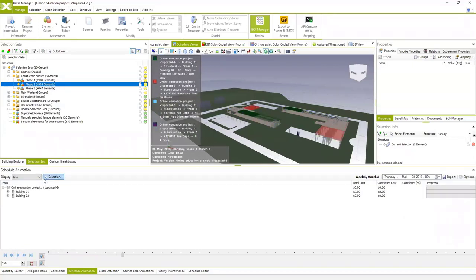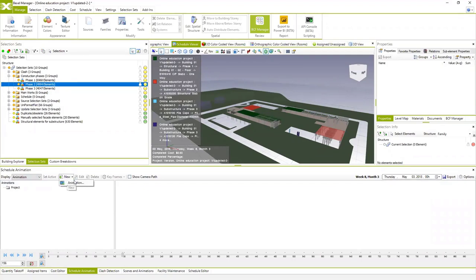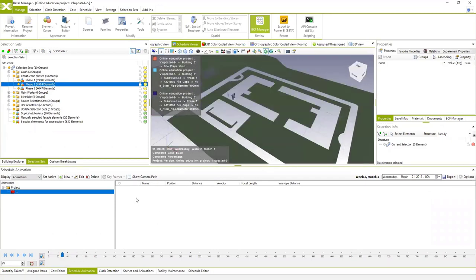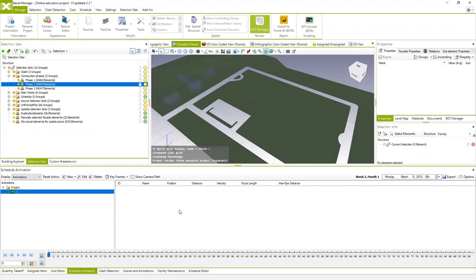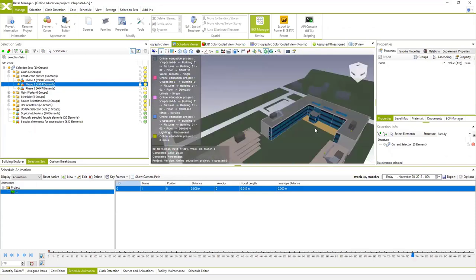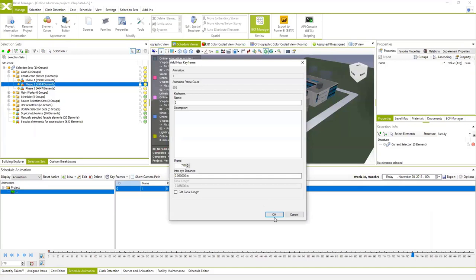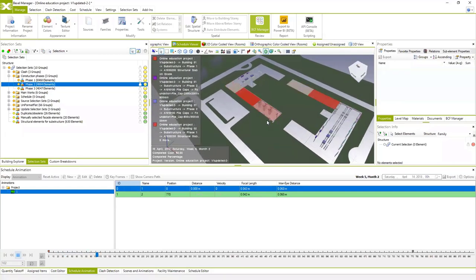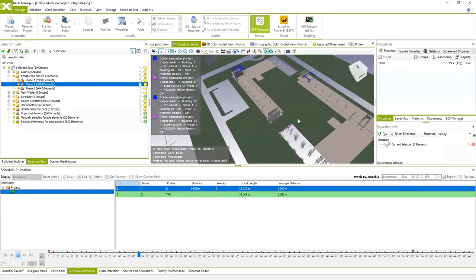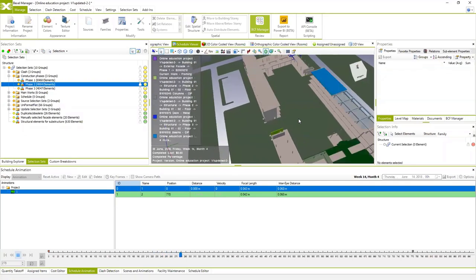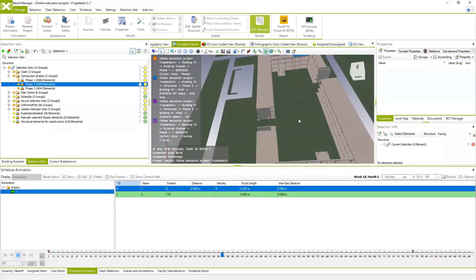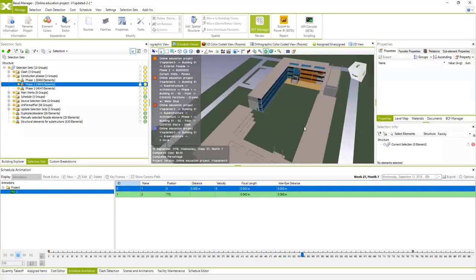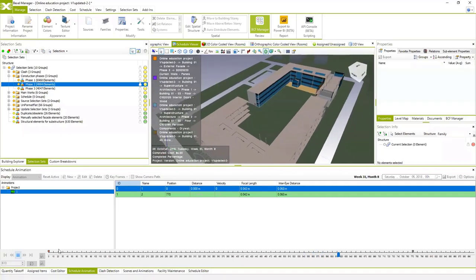If we have an animation we can use it or create a new animation to change the camera rotation around the building during execution. I'll create a new keyframe here, and at the end the keyframe can be placed here, hit OK. This is your 4D simulation — automatically linked to the BIM model. We didn't create all specific selection sets for each leaf of your activities; the system did that automatically by segregating specific levels and hierarchy of the schedule.